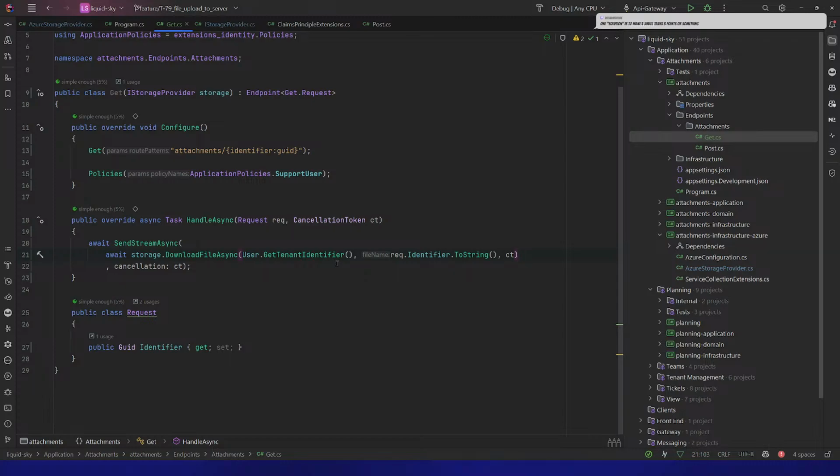Again, that's why I think a reference story is necessary. You find a reference story and you say, okay, this rough amount of work. So we have a query, we have a screen, we have an update, and we have a button, and that's the feature. We're going to say that's a 3 point story. That's what we agree upon. Here we've documented it. This is the amount of work. That's what we should be basing our effort on, right? So every story that comes along should be relative to that story's 3 points. And the general rule is five is almost twice as much work as a three.